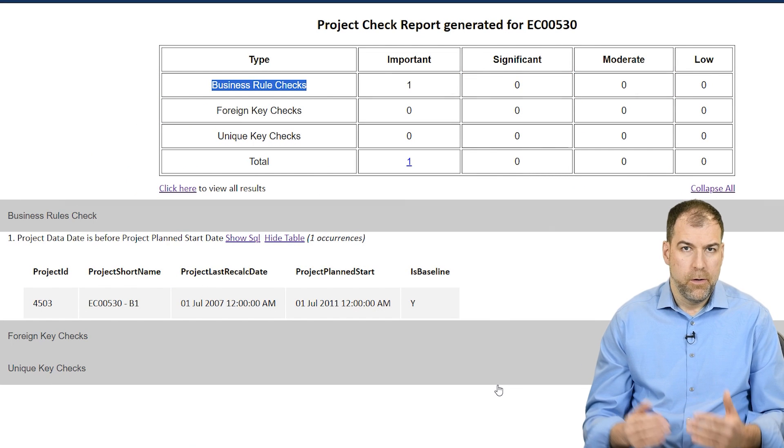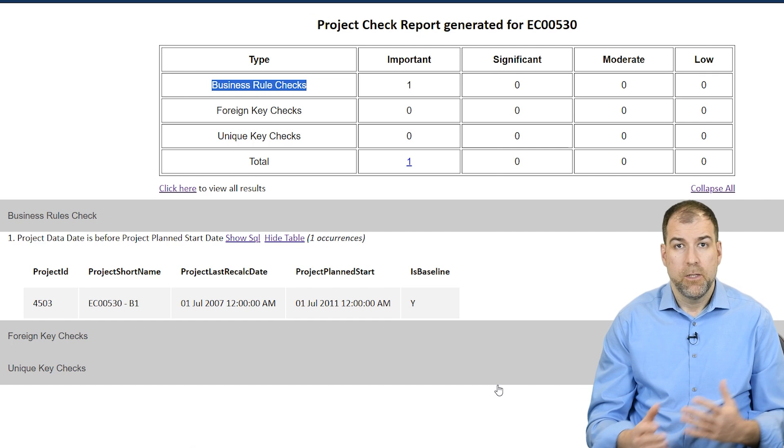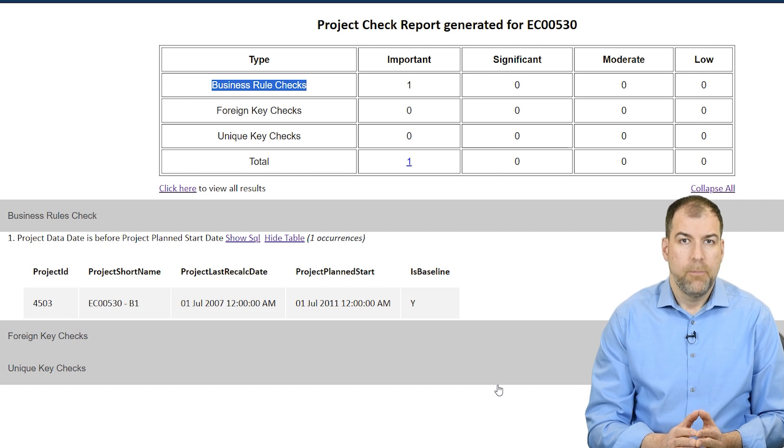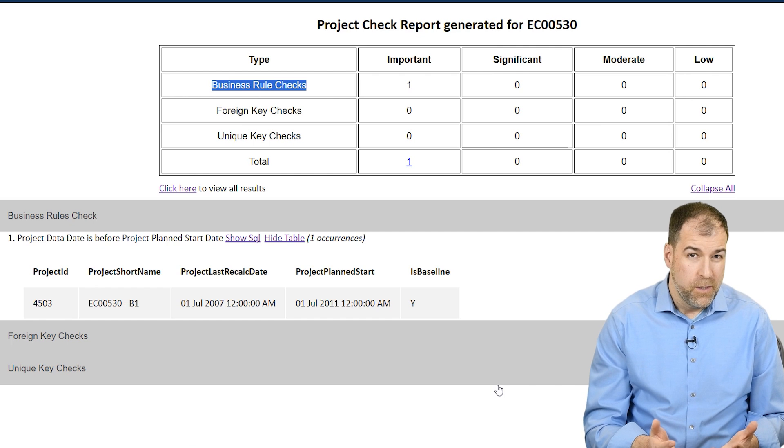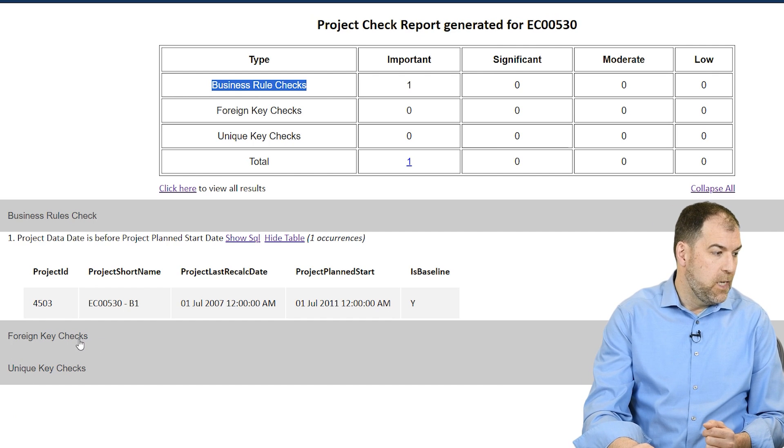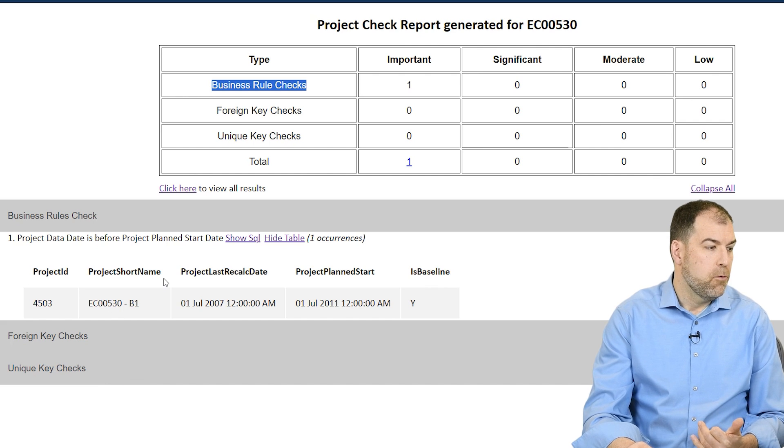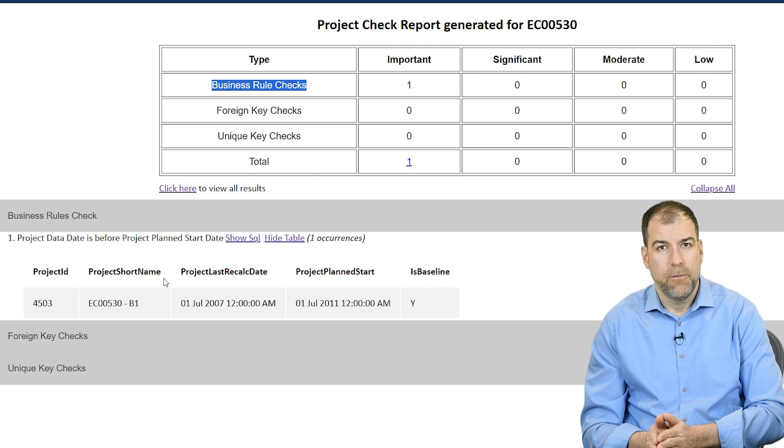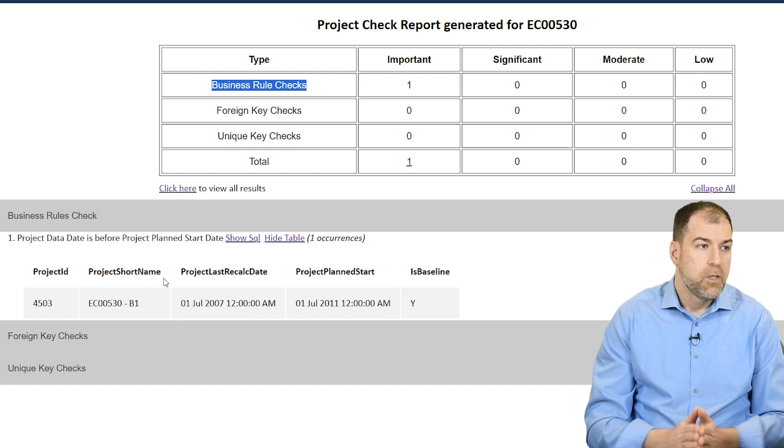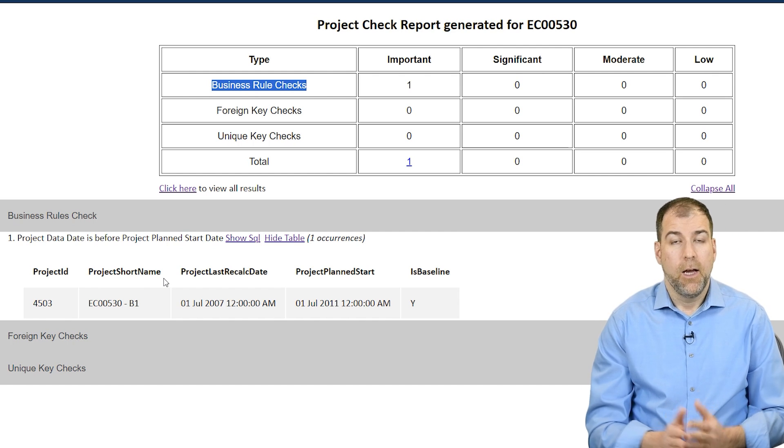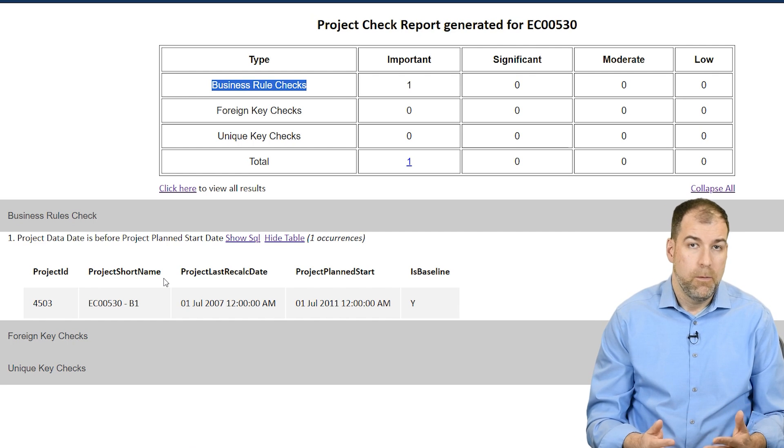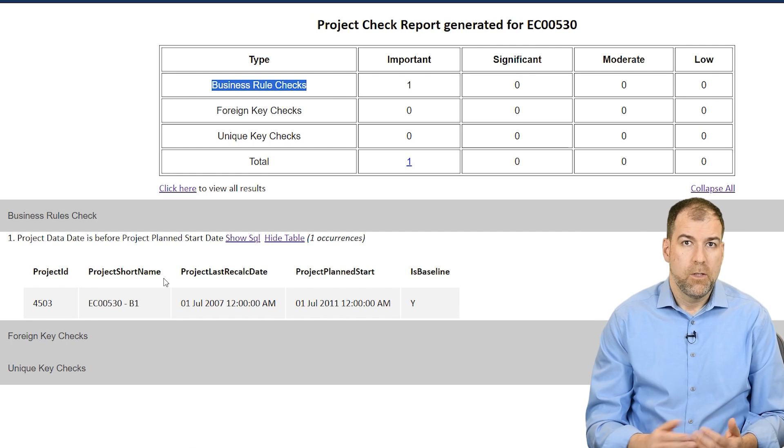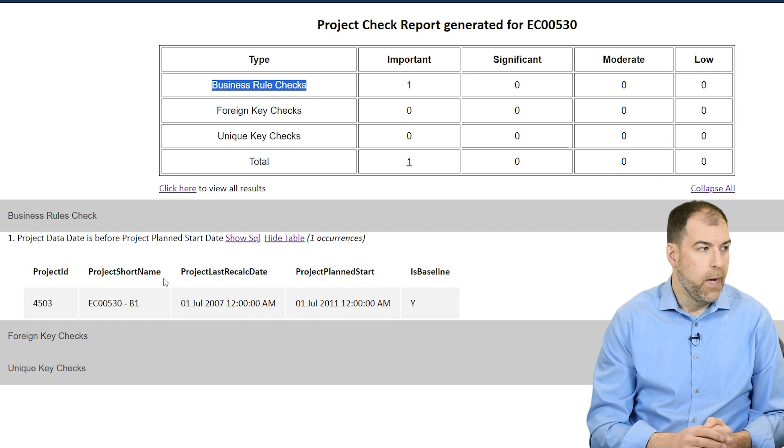I guess when we are doing so much exporting and importing projects between databases, sometimes we're ending up with projects that have data that is orphaned. That's what some of these foreign key checks are about and unique key checks. Business rule checks are like the integrity of your data date doesn't ever end up before your project start date, things like that. So this is all about data integrity. And I guess they're releasing this because we need to do these kinds of analysis on projects when things get out of whack.